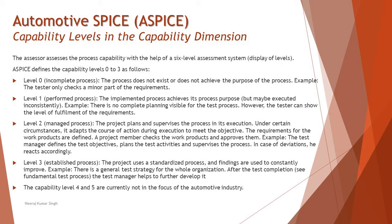Level 3 is the established process. The project uses a standardized process and findings are used to constantly improve. You have a standard process, and every time you perform it you conduct a retrospective at the end to gather lessons learned, improvise the process further, and put in enhancements to prevent mistakes from recurring. That's what we call Level 3 — the established process.